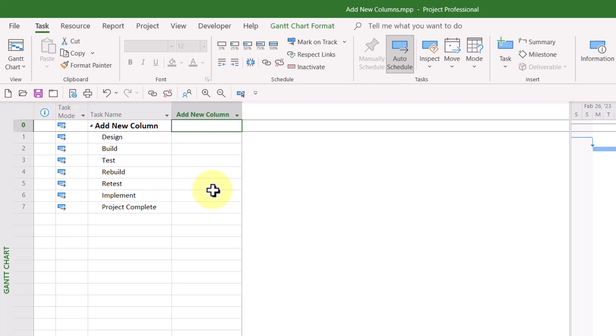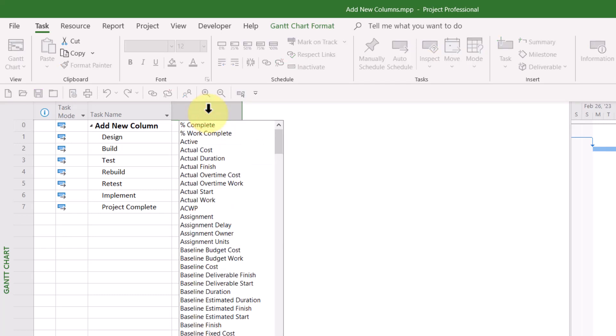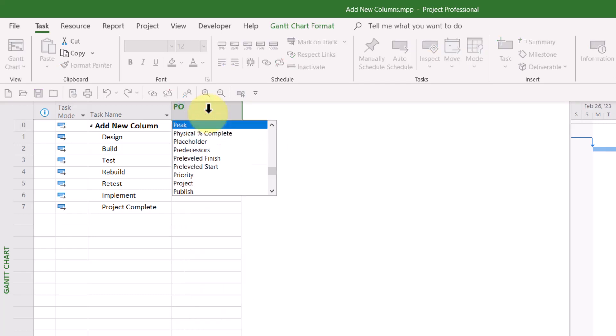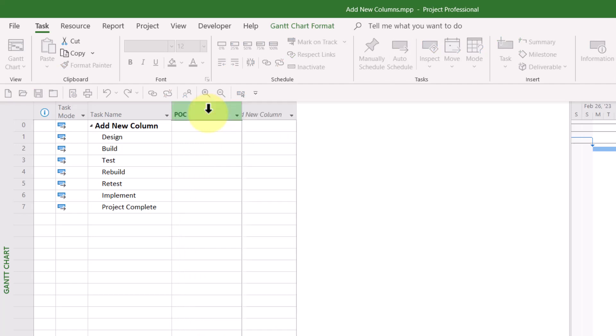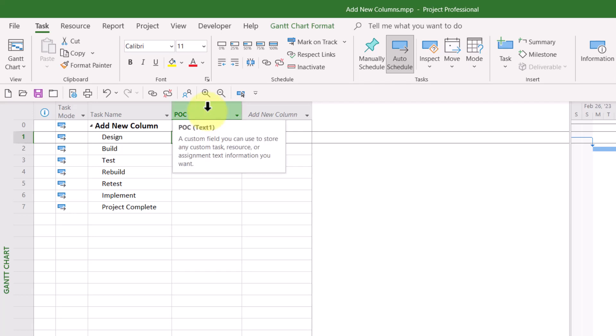The first thing I'd like to show you is when you click in the column header of this column and you type the name of a field that is not a default field in Microsoft Project, here's what happens. Microsoft Project will automatically insert the first available text field and then it will rename that text field based on the name that you just entered. So you can see, for example, my POC field is the renamed version of text one.